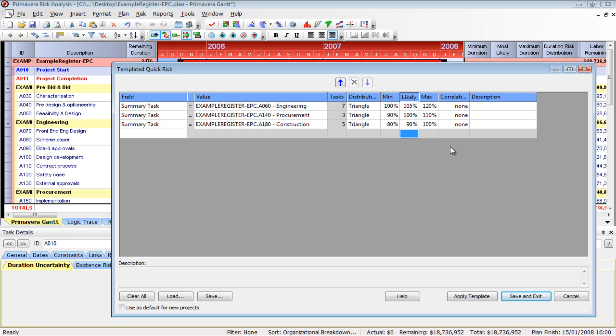What's nice about doing this is, in a Monte Carlo analysis, the answers are always wrong. Not that they're truly wrong, just people don't like the answer, whether it's bad news or what have you. If you can show someone the inputs and say the answer's never wrong, but sometimes the inputs are wrong. We've got two inputs, our risk inputs and our schedule. Either our schedule is flawed, our risk inputs are flawed, or the answer is right. Let's look through these inputs and see where our flaws are.